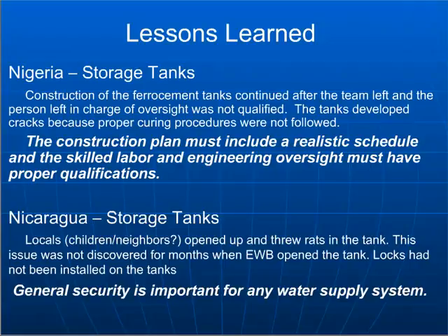So again, include a realistic construction schedule. What can your chapter realistically expect to accomplish? And if you are going to rely on skilled masons or skilled contractors to complete any work that's left undone, make sure that what you've specified is in line with their talents and their capabilities.